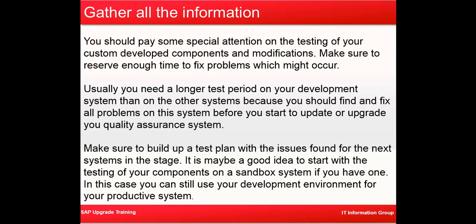You need to involve your end users and your key people. You need to have the test plan for each of the business functions, to test and ensure that once the upgrade is done, everything is going to work fine. All that is tested in your sandbox system, in your dev system, before it can be applied to the production system.